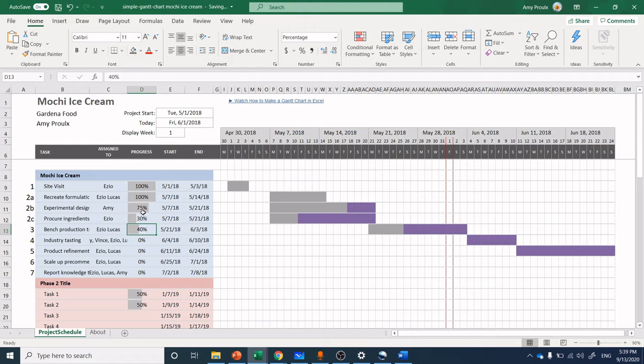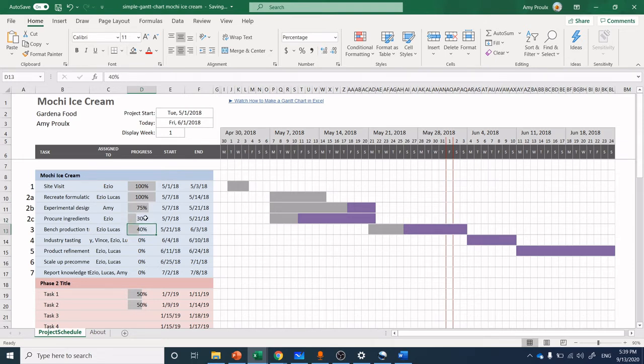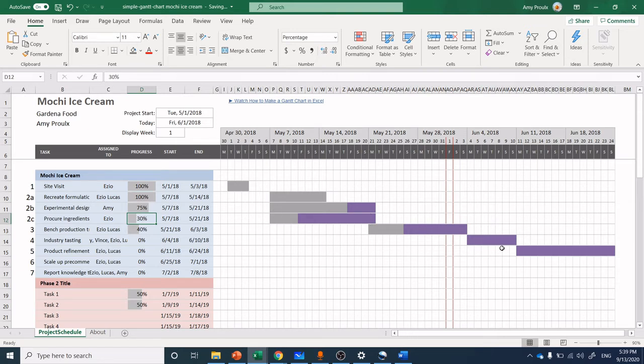And Ezio can say, well, you know what, I've ordered in 10 different ingredients, and I've only received three of them. Well, then you'd say, okay, perhaps we're at 30%. And then you say, where are we at in terms of bench production trials? Well, we've been able to recreate the formula. And based off of the ingredients that we have, we are roughly 40% done, but we're waiting on the ingredients that are waiting here. What we just talked about here is a dependent activity. So when you can't move ahead on something here, because you need a prior activity to be done, you have dependency in your activities. So it looks like there's overlap, but there's actual dependency here.